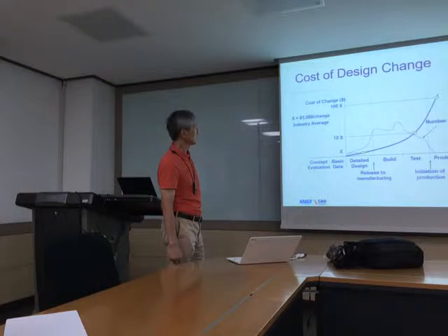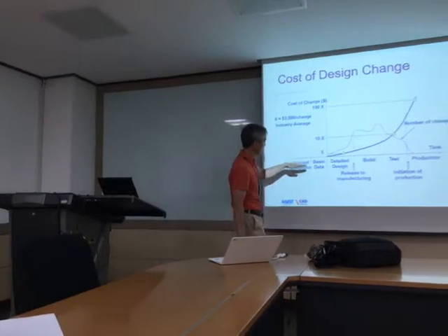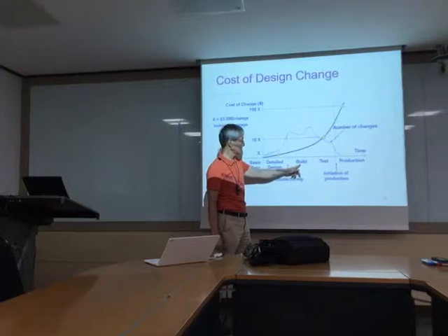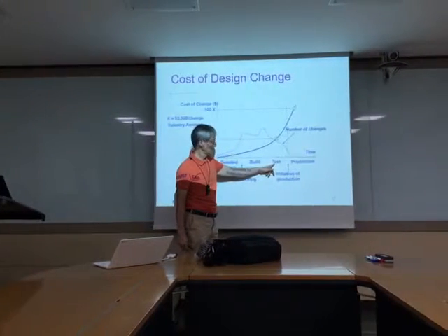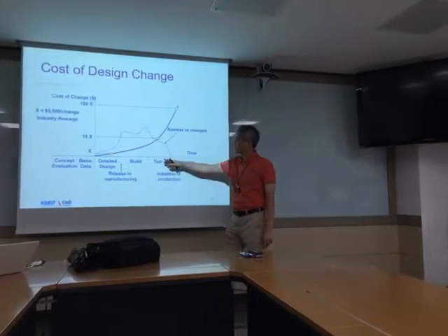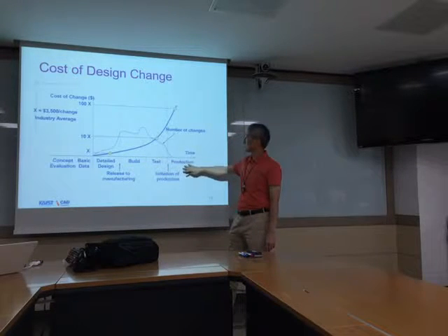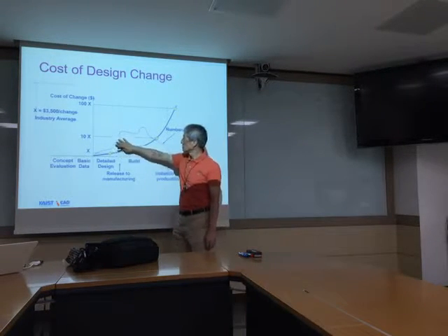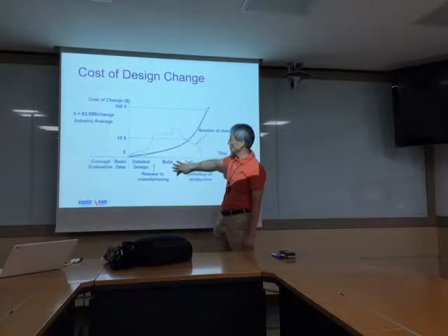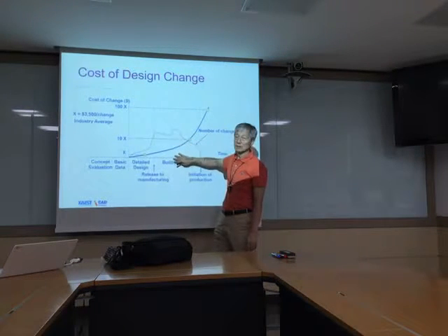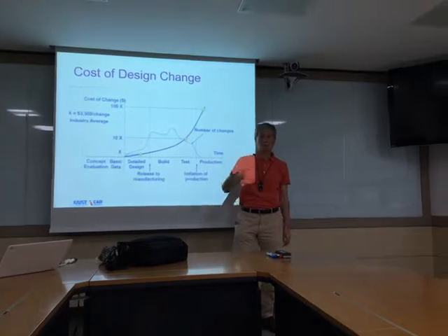And design change. This is related to product life cycle. Concept design, basic design, detail design, and construction and manufacturing and testing, and then mass production. Sometimes it's a prototype build and mass production here, and then delivery somewhere. But you see the number of design changes is higher around this prototype manufacturing, build, or test area. Design changes happen because they find problems there. Right?